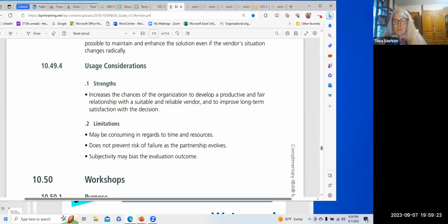And then Robert also touched on a very crucial point: if you have your own IT on site, you will want to try to quantify what type of work it's going to involve for them. It's not just that you sign a contract and the vendor takes it from there. Well, sometimes, but most of the time these days, especially for cloud or SaaS related processes, there's going to be some effort on the part of the entity that wants to sign that vendor up.